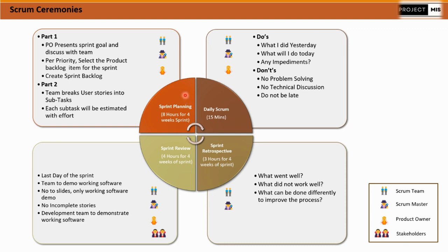But a 2-week sprint is the most common sprint cadence, which is quite popular. So if we are going for a 2-week sprint, then we should ideally be spending 4 hours in sprint planning, which is more than sufficient to plan for a sprint. What is the basic idea in sprint planning? The basic idea is to prepare ourselves before we start the sprint.